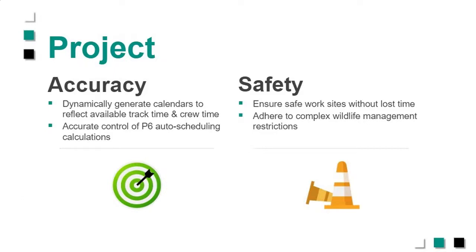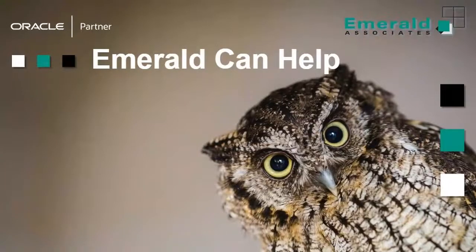As I mentioned, we've got auto archiving, we've got auto loop detection, we've got auto scheduling. So we've got many clients that have scheduling running every single night because they've got integrations that bring in actual data, and then the scheduling runs automatically, and then a bunch of the utilities run automatically. Okay, so there's a lot of different ways that we've deployed Calculator, and the ultimate goal is to save you time, save you frustration, helps with accuracy, which of course makes your reporting stronger.